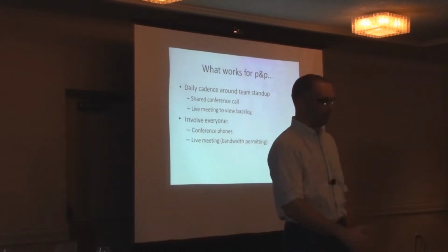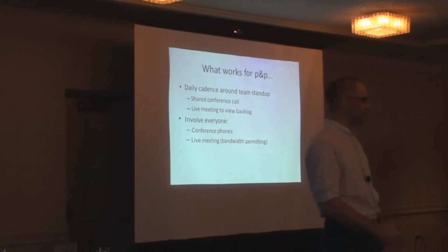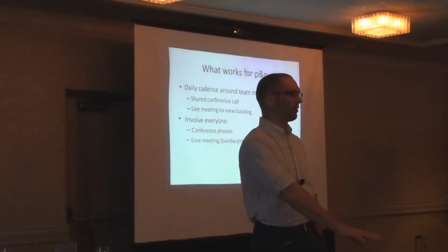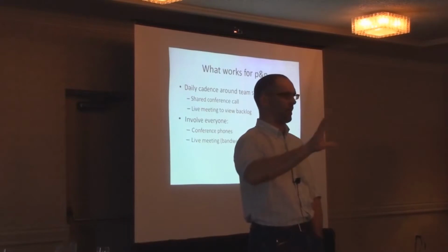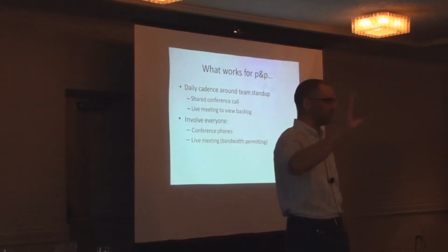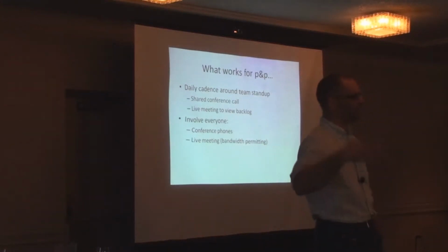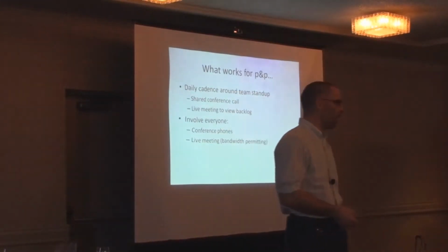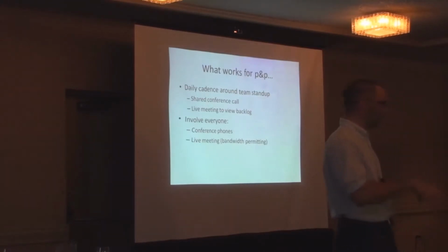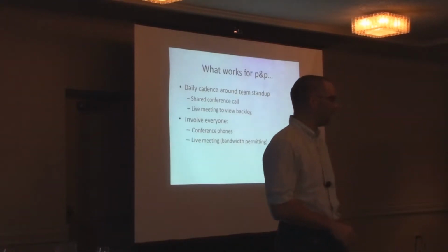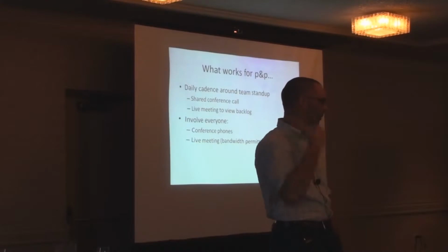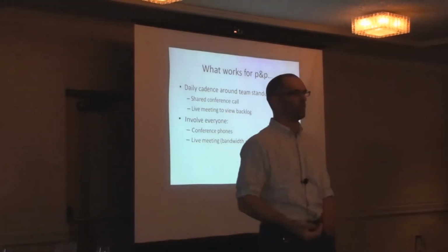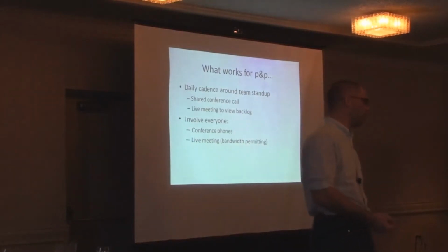10 o'clock, everybody's in the team room, everybody's around the conference phone. We typically have shared conference phones in all the team rooms. They have projection screens so you can project stuff on the wall, typically the product backlog, what people are thinking about, the tasks for the iteration, are all projected, but everyone's religiously in the team room for that meeting. And it just builds up a structure that you wouldn't get when everyone's distributed. Everyone knows when they're going to call into it.